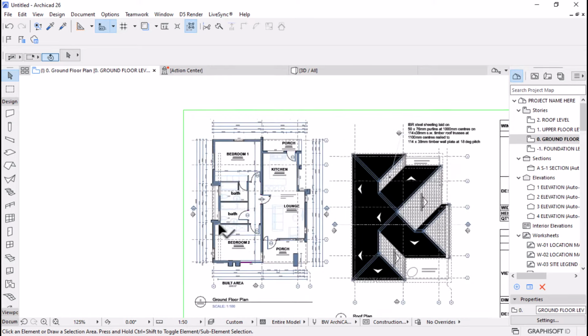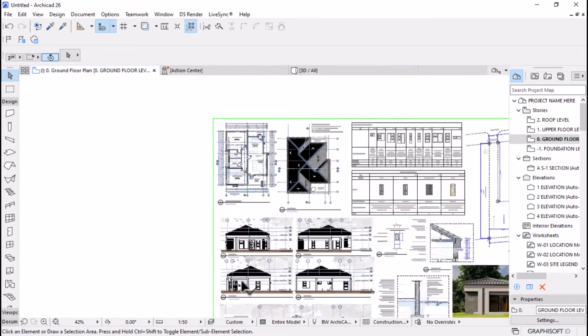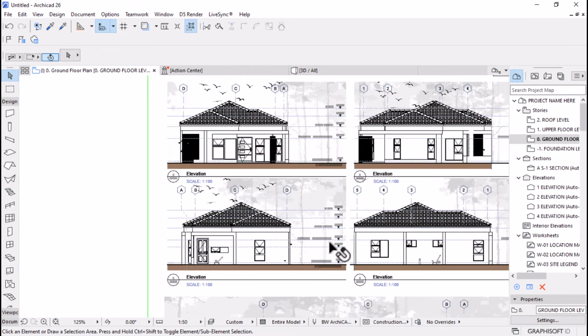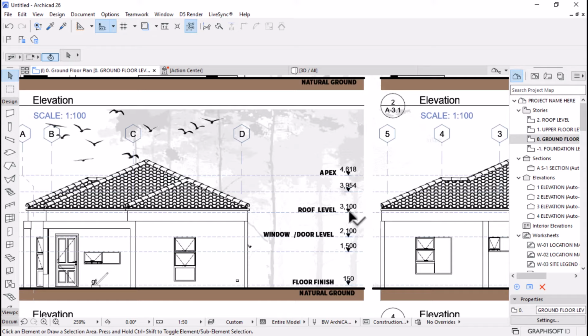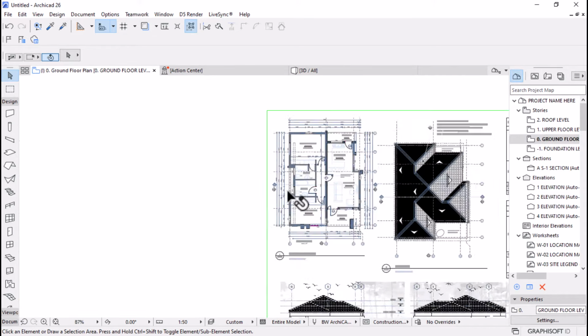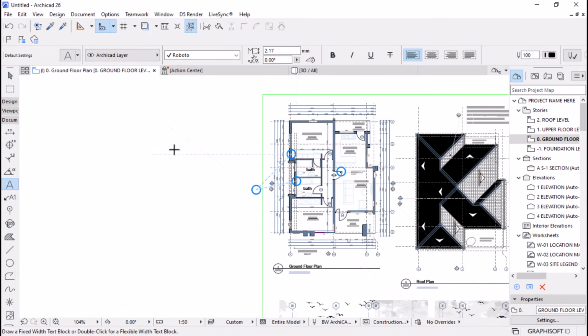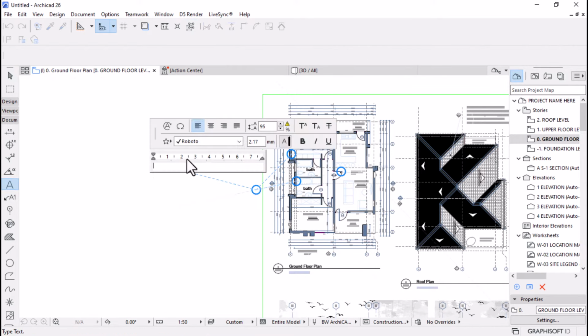So to calculate the surface area, I would need the length and the height. The height information is going to be in the elevations or section. The height of the wall is 3.1. So what I would do, let me bring a text here, go to the design tool palette, under documents, let's find the text tool. What I'll do, I'll say I have four walls, right?